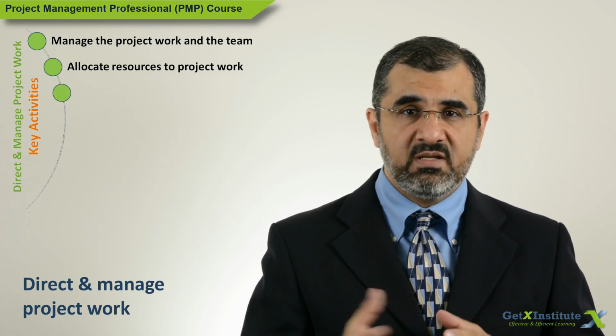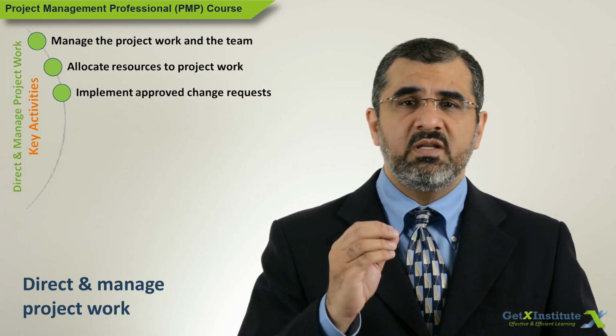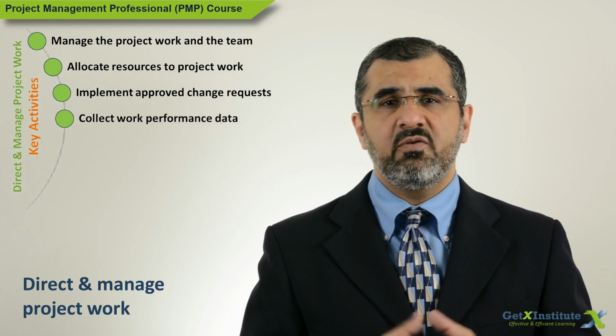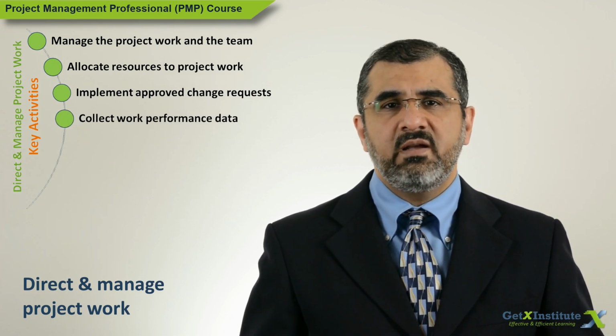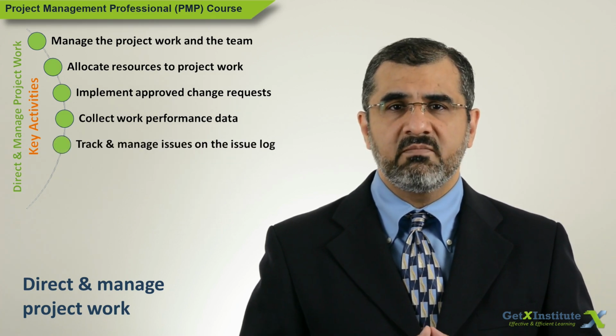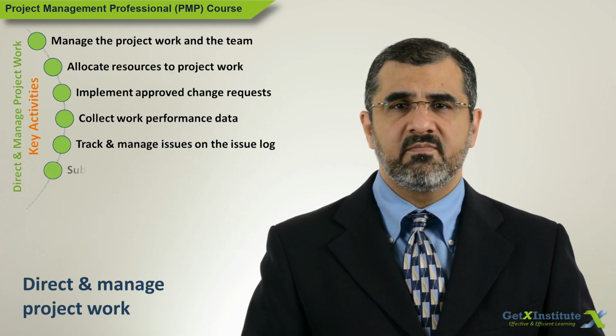As work is being done, work performance data will be generated. So the project manager will collect this data. This can include data like when an activity started, how many hours were spent on an activity, how many resources were working on an activity, and so on.